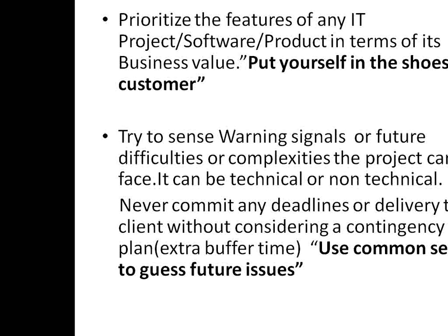The other thing is that once I know the warning signals, then only I should commit on some deadlines. I should never commit something to the client without having a contingency plan. In the SDLC, we always say that there should be 5 to 15% buffer time kept for any contingency, for risk management. Because anything can happen in the future. The technology I am using might become obsolete. The tool I am using, the company which developed the tool, the company closes down. Anything can happen, just imagine. So I have to have some disaster recovery contingency plan, say 5 to 10% of my time. And then only I should give some deadlines or commitment to the client.